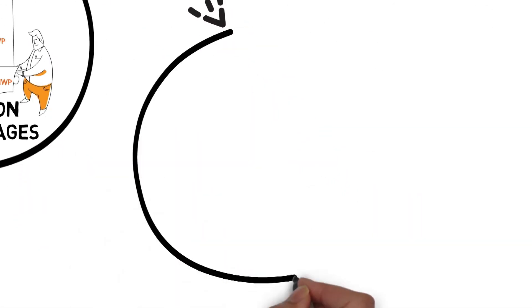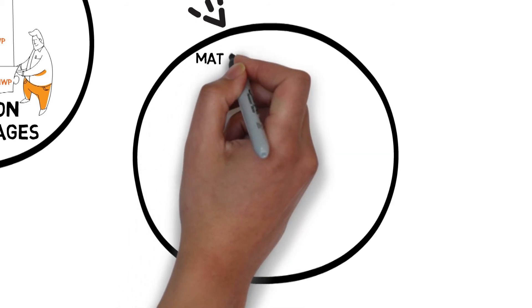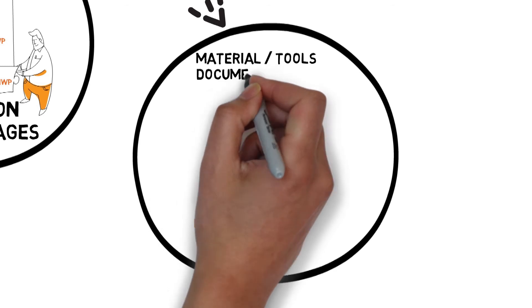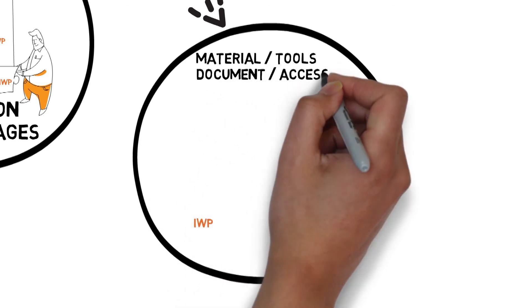As IWPs enter the 3-week look ahead, the on-site material team bag and tag components so that they are staged and ready to ship, and the scaffold team erect scaffolds to provide access.